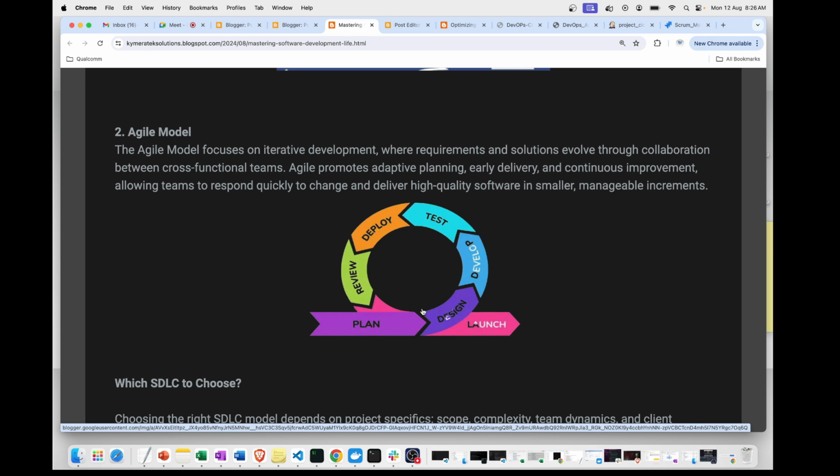Once you deliver the sprint, let's say you have 5 tasks in this particular sprint, which spans 1 week, and you have delivered it. You don't sit idle until testing completes, deployment completes, and you get the feedback, and only then start a new requirement. There will already be a product backlog with a set of requirements based on priority. On the sprint model, you pick that in the next sprint.